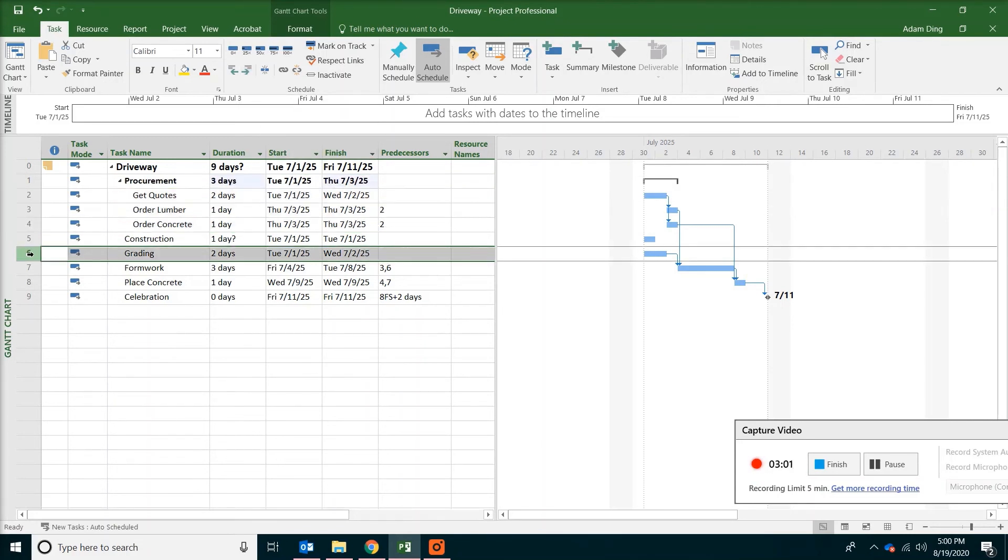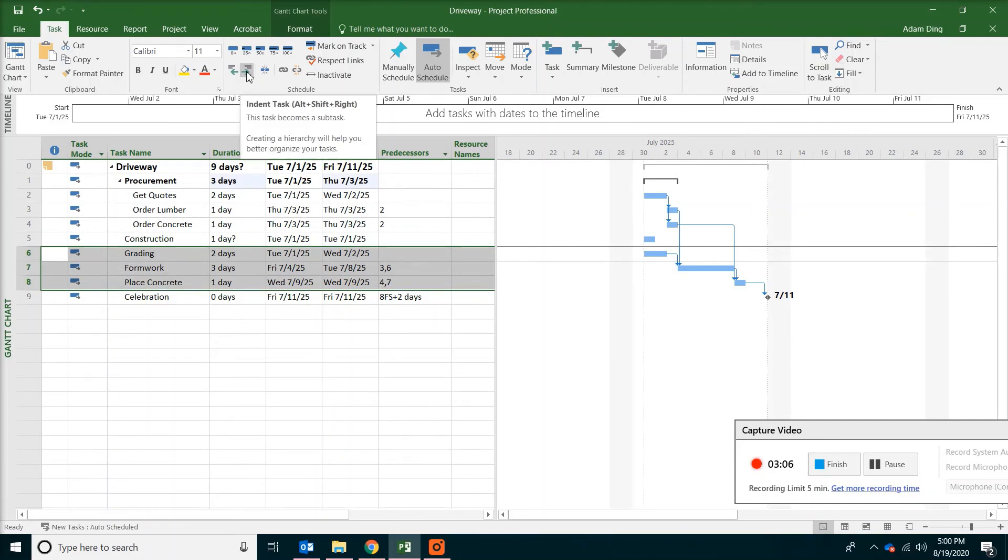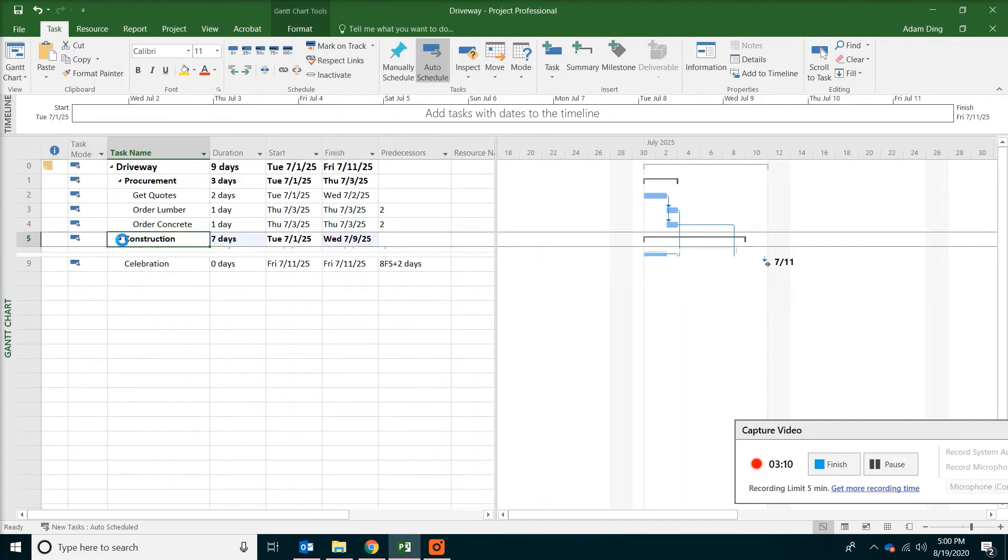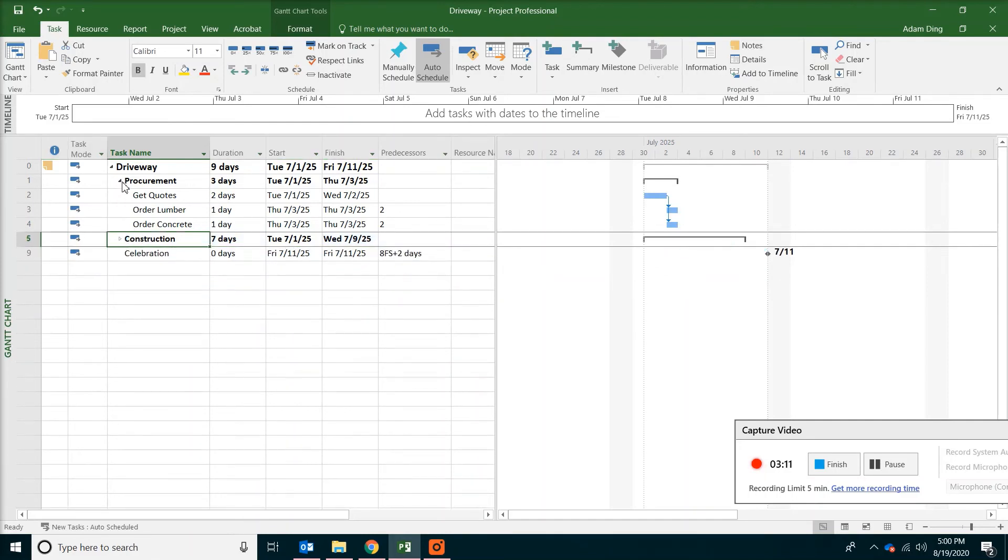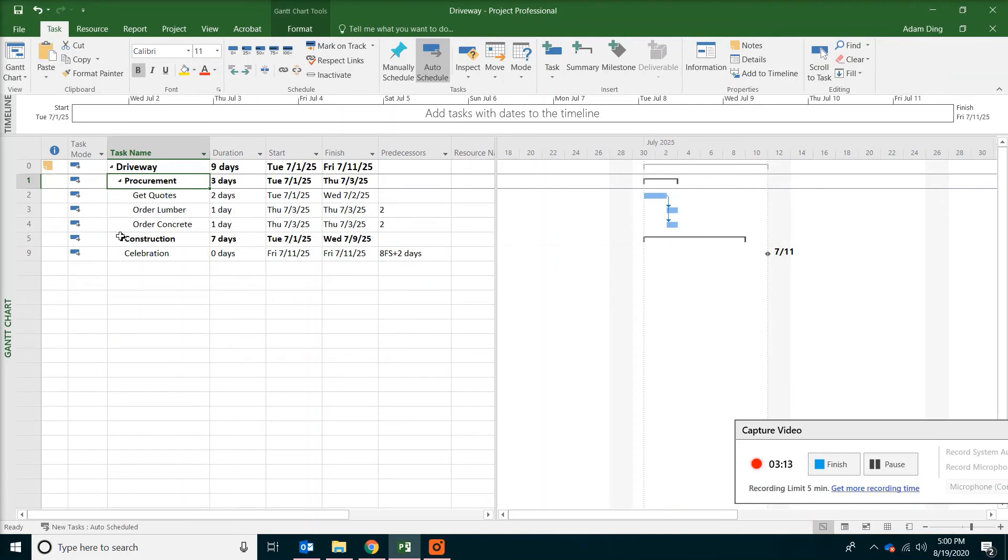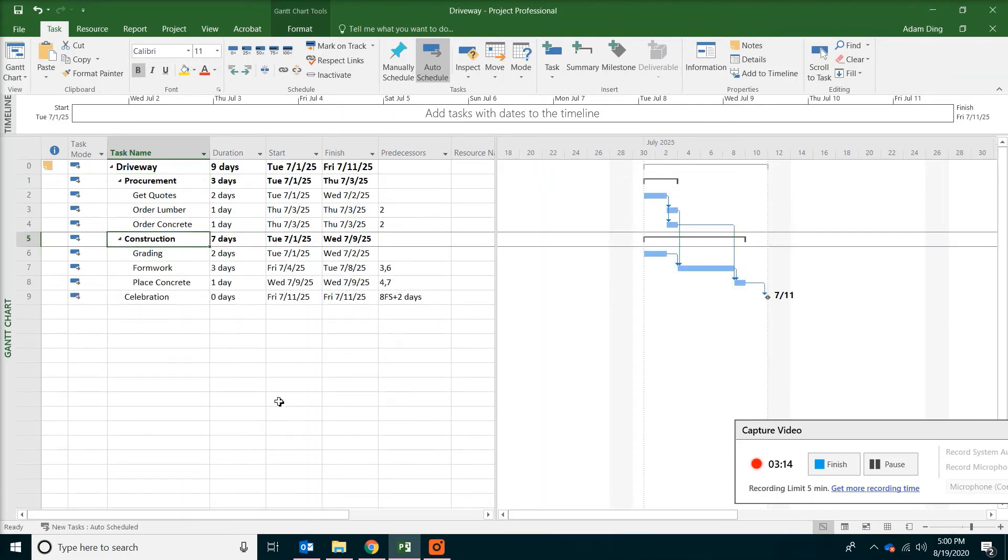Do the same thing with grading. Formwork. And place concrete. Also do the indent. You can see how the project has been reorganized. This completes the work breakdown structure.